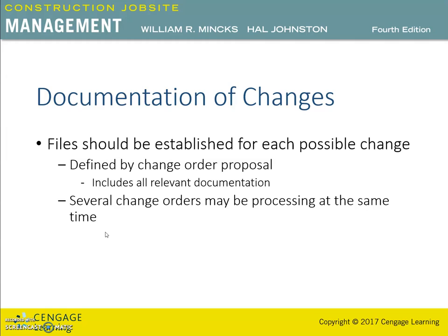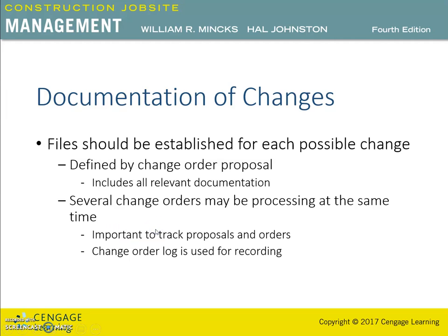There may be a situation when several change orders are in processing at the same time during the project. As this involves many steps, it is extremely important to track all change proposals and change orders. A change order log records the dates of the steps in processing the change order. This log can be used to determine the current location of the change order.